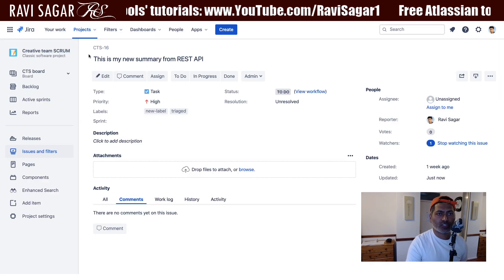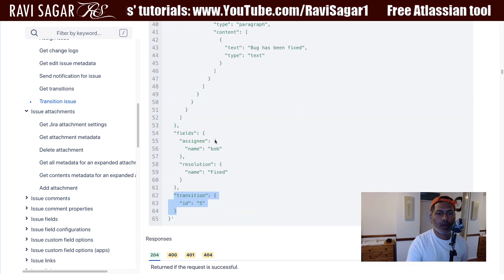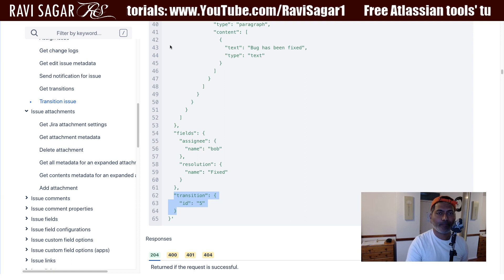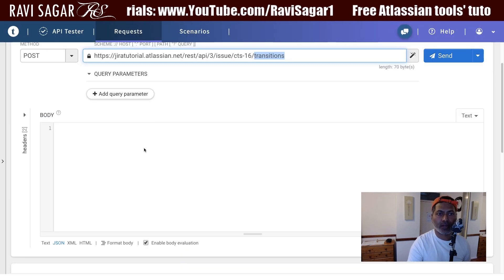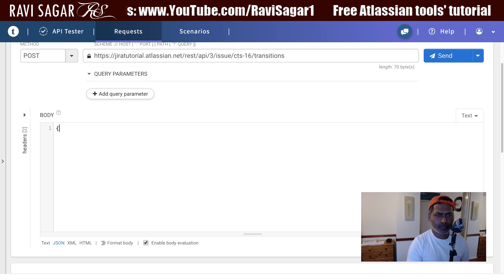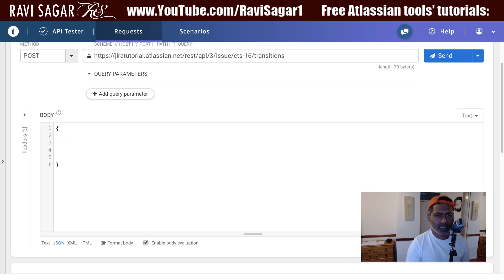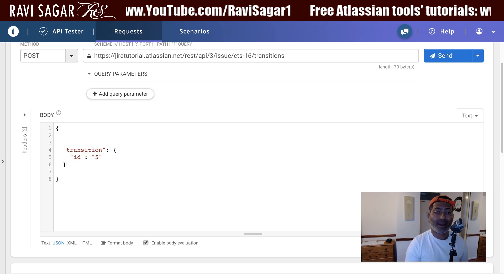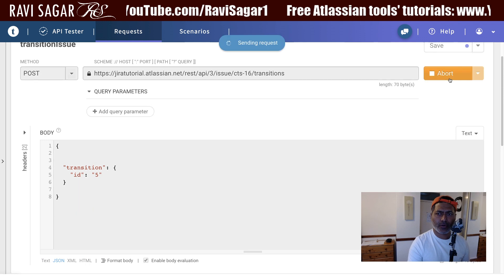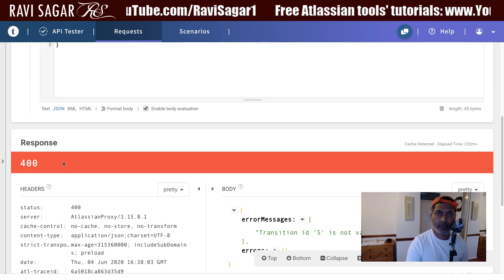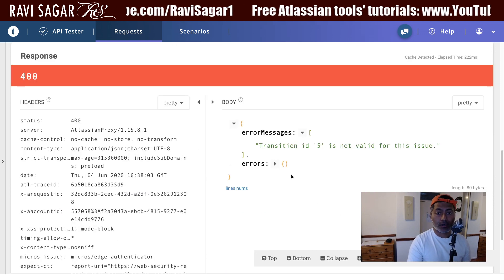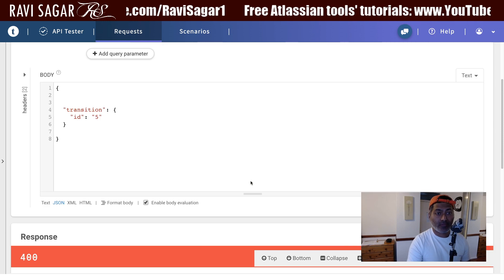I want to transition the issue. I will specify transition ID 21 for 'in progress' and 31 for 'done'. The only thing you need to worry about is making sure the format is correct. Let me first try transition ID 5 — if I click send, I get error 400. The error is very clear: transition ID 5 is not valid for this issue. The valid transitions are 21 or 31.